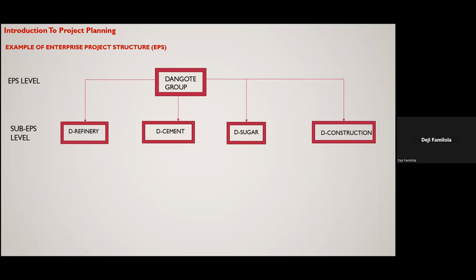If it's not on the critical path, okay. If it's on the critical path, that is very, very serious, we need to find a way to recover that time. So we tend to go back to our contingency and use it. But in some cases, you have backup for all these people. In other cases, you rely on a person that I won't call a monopoly of that field.